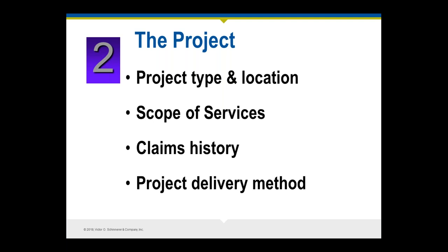You want to look at the project delivery method. Is this the more traditional design-bid-build, or is it a design-build? If you're the design builder, you'll have enhanced exposure for claims for bodily injury, property damage, and economic loss, and you'll be responsible for construction means and methods and job site safety. More typically, design professionals are a subconsultant to a design builder. Will there be one general contractor or perhaps a construction manager and multiple prime contractors? The presence of a construction manager adds another party. More fragmentation of the project delivery method and multiple primes can increase scheduling and coordination issues.